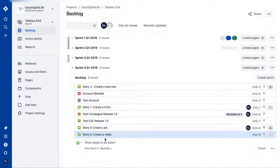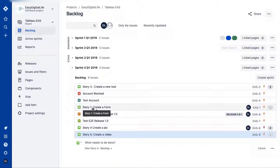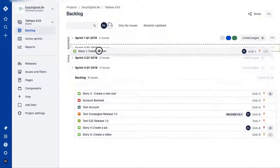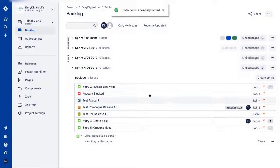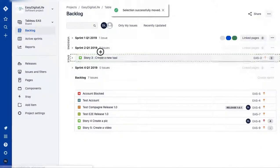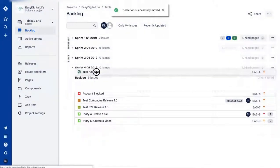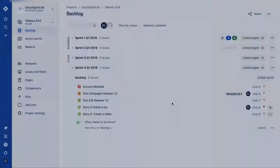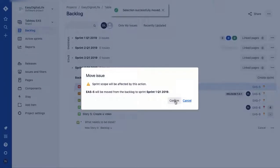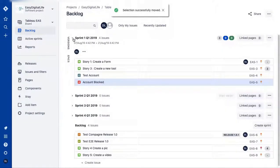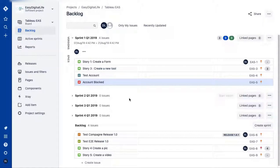Creating sprints and creating issues in the backlog are the main steps to get started in Jira. You can then drag and drop your issues into sprints. For example, I'll take Story 1 and put it in Sprint 1, then confirm. I'll also drag a test item into the sprint, and you can see those are now the issues in my current sprint.